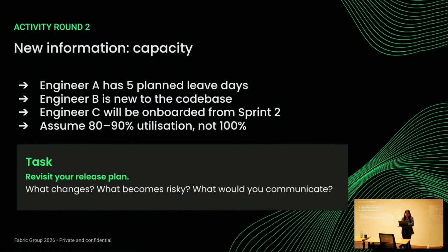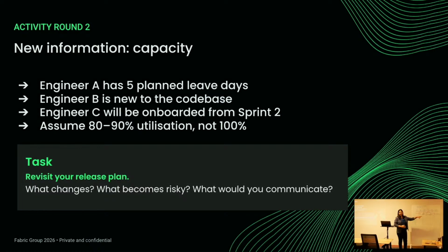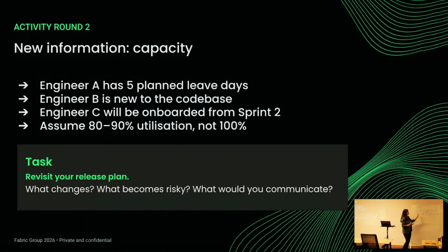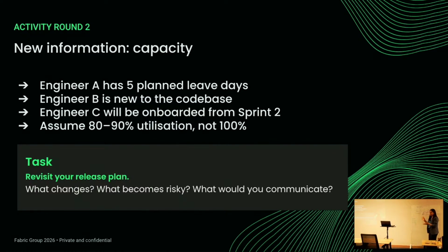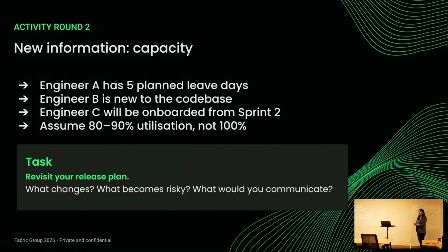Cool. Another thing that some of you brought out while we were talking about release planning is, oh wait, what if my auth server is not set up? What if the APIs that I need to consume are not ready? All of those are termed dependencies. These plans talk about functional features, but not about anything else that a feature delivery depends upon. Do we have the auth server ready for me to build my login? Maybe not, and when is that going to be ready? Till it's ready, I can't build my login page or user authentication, for instance.